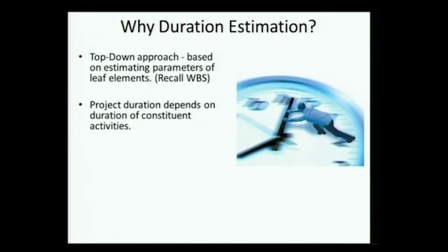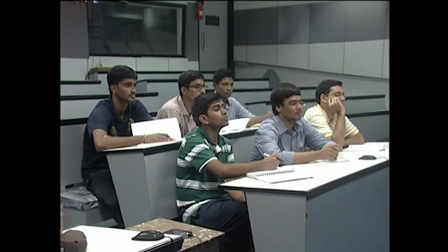Any other reason? Your planning will be based on the durations of each of the activities to track the progress, for example. Right. So what we talk about is estimating intermediate milestones. So we are not just interested in project duration, we are also interested in the detailed milestones of progress. So we need it for estimating milestones. And finding out the labor, resources, when to get allocation.